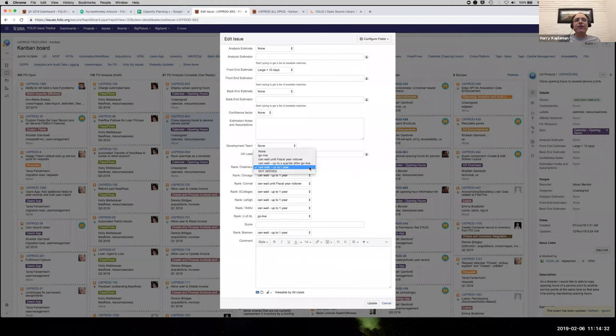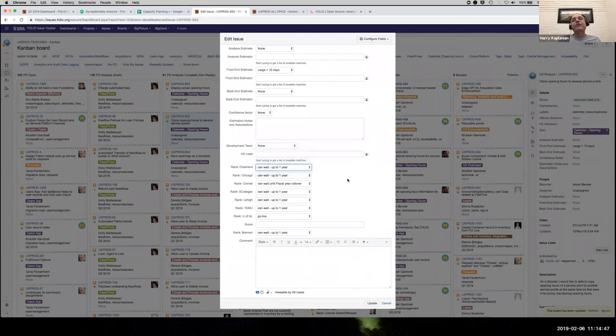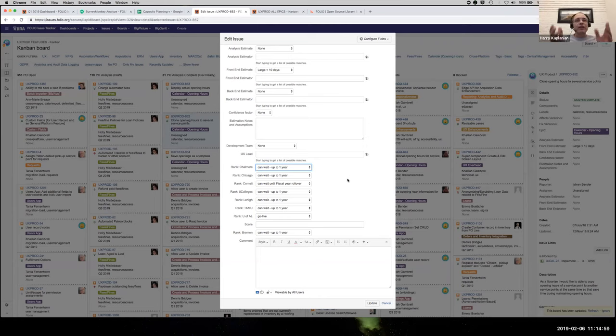And if we take a look at this, they're able to rank these as in what do they need for go live? What can wait for the next fiscal year rollover? What can wait up to a quarter after go live or can wait up to a year or even what's just not needed? And we've got this for all the features within the system, or at least almost all of them. Sometimes as we add a batch of new features, it'll take a little bit of time.